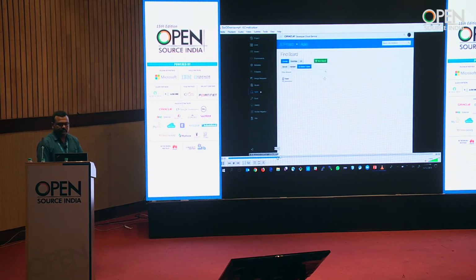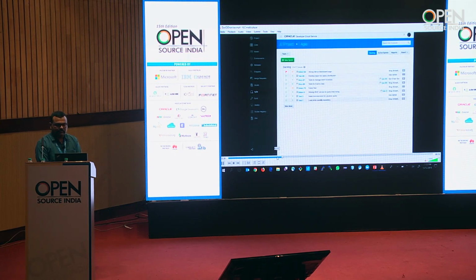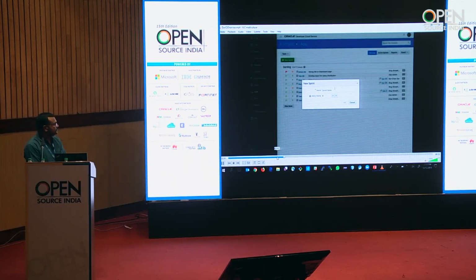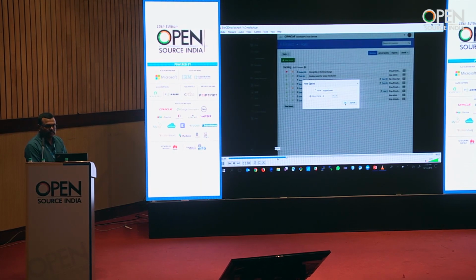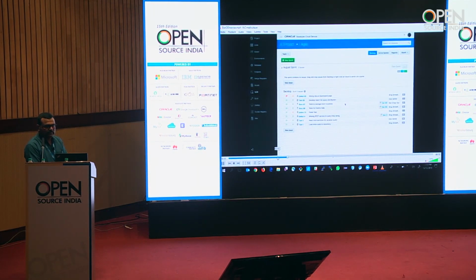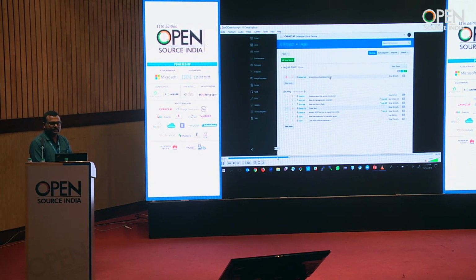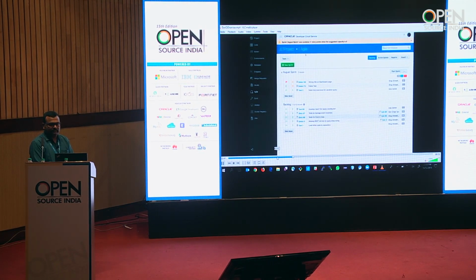Next, we're going to look at some of the agile capabilities of Developer Cloud Service. Here we see our backlog of issues. We're going to create a new development sprint, associate a complexity level with that sprint, and then we are simply adding items that we want to handle in the next development sprint by dragging and dropping them into the sprint. Developer Cloud Service keeps tabs on the amount of complexity we are targeting, and if we are breaching this amount of complexity by adding too many issues, we'll get a notification up here.